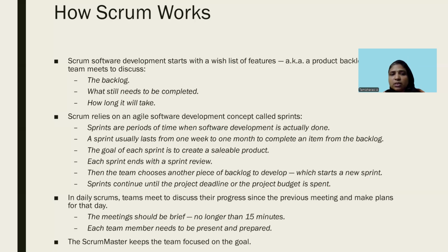When it comes to Scrum, one more main concept is the meeting. There will be a Scrum meeting held every day to discuss the progress of the project. This is a very short meeting, mostly 15 minutes. Here they discuss only three things: what has been completed, what the plan is for the next day, and whether there are any issues to be focused on.